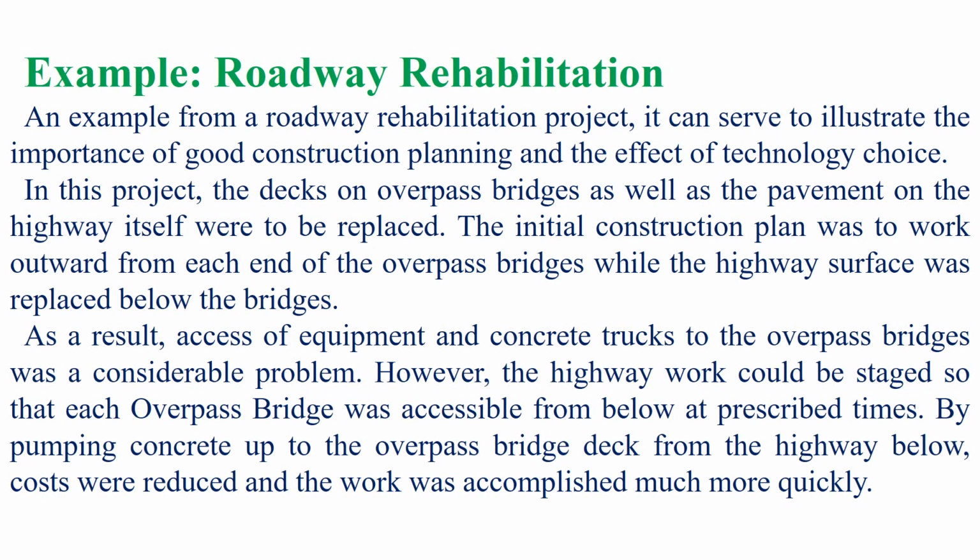The initial construction plan was to work outward from each end of the overpass bridges, while the highway surface was replaced below the bridge. As a result, access of equipment and concrete trucks to the overpass bridge was a considerable problem. However, the highway work could be staged so that each overpass bridge could be accessible from below at prescribed times.